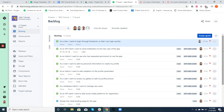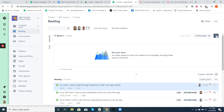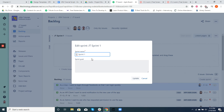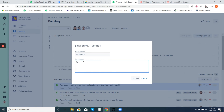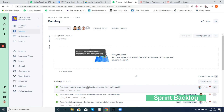Now that we have created our backlog, let's create and start our first sprint. To create a sprint, click the Create Sprint button. We just created a sprint called GT Sprint 1. You can edit the sprint name if you would like. It's always good to have a sprint goal to know what you are delivering at the end of the sprint.